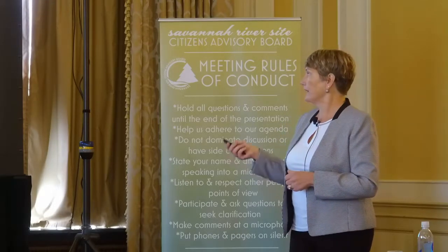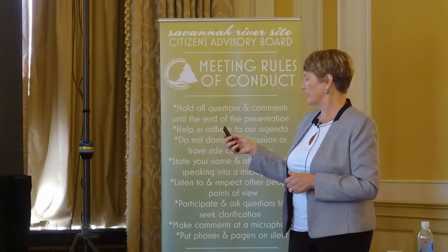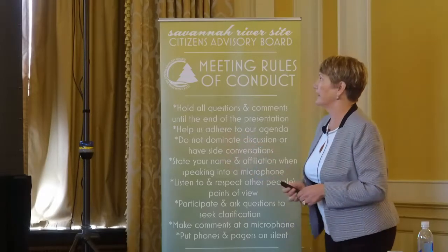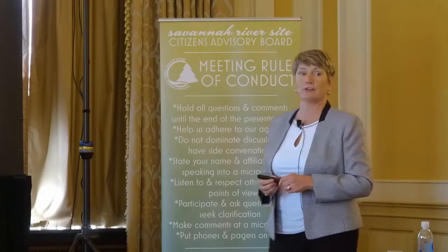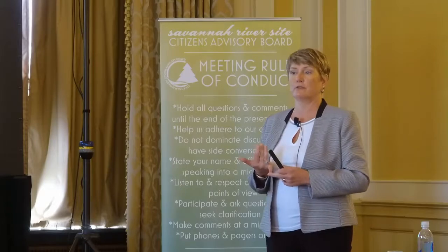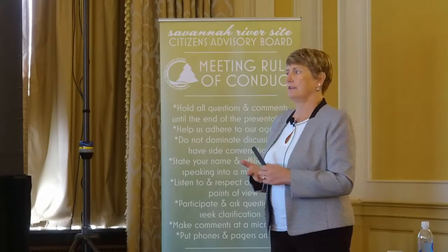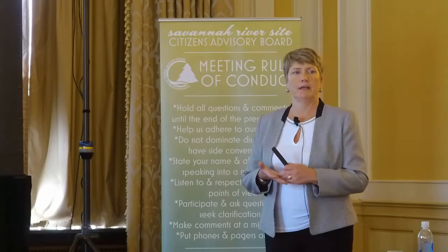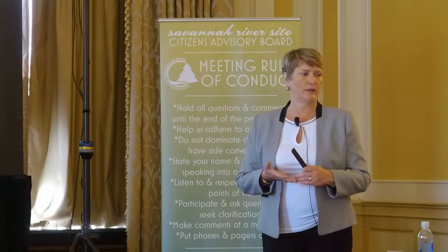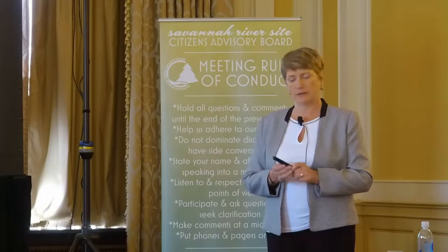At this point, the next step in the process would be to go into the contractor ORR. We anticipate that's going to occur this fall. That's the current schedule. We do the contractor operational readiness review, and once they resolve any issues that are identified, then DOE brings in an independent team, and we do our own operational readiness review. All of those steps lead up to our authorization to operate the facility.